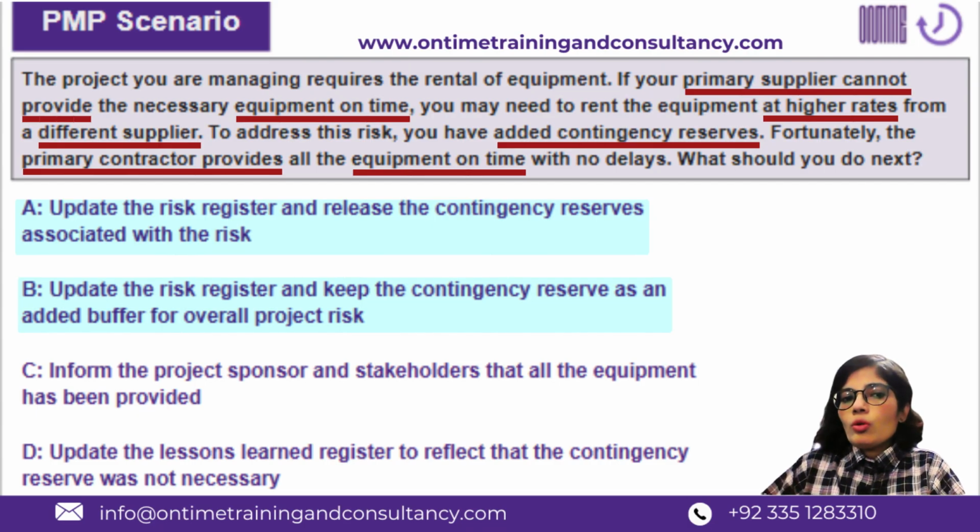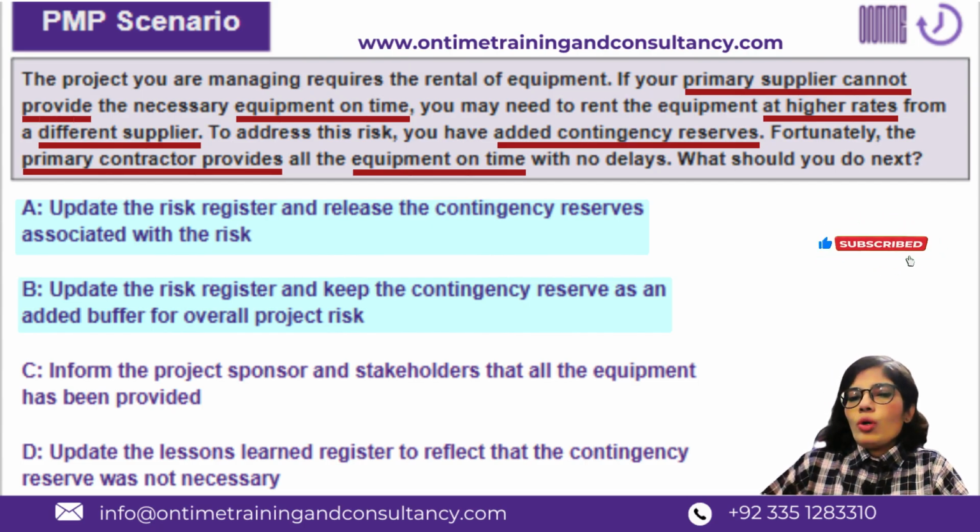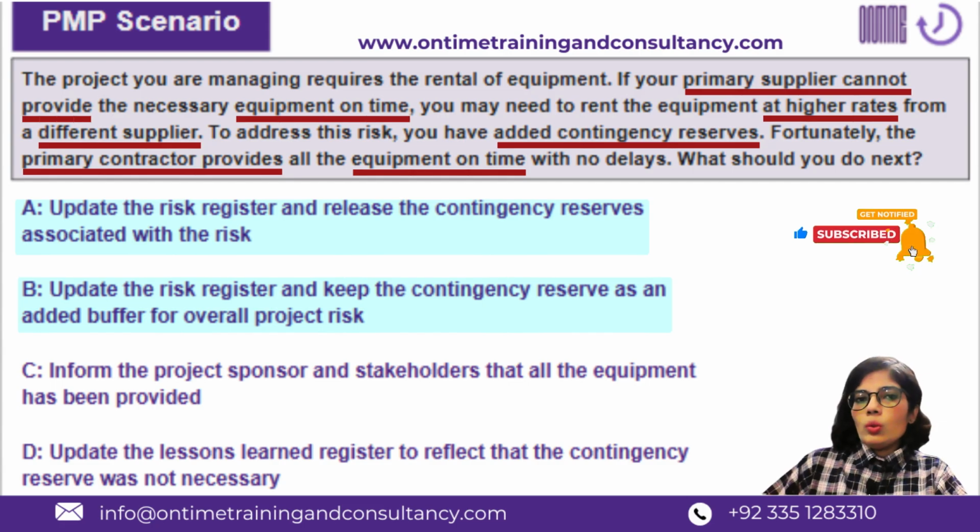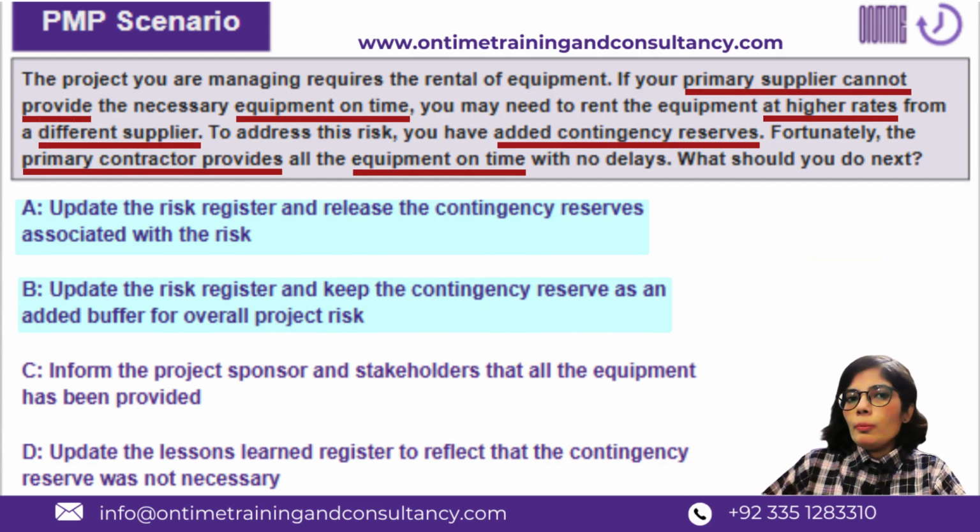But something which is already known, like some other risks which are already known, we would definitely have a separate allocation and contingencies and resourcing, owners, everything related to that. This is how it works in the project risk. And something which is not known, why would you want to allocate a budget, or hold a budget for that particular situation which is unknown risk? Because contingency is meant for known risk. And for the unknown risk, we have a separate provision, which is management reserve, right?